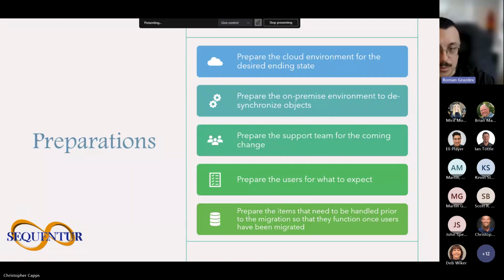There's no reason, first of all, they shouldn't be done. They should always be done. And second of all, you want to get this environment in the cloud as clean and as perfect as possible before you start, because moving stuff will break it. You'll make it messy. It's like moving to your home. It's going to get messy. But if it's messy from the beginning, it is going to be terrible. So this is definitely a lesson learned: you really have to have all your ducks in a row before you start. Does anybody have any questions?